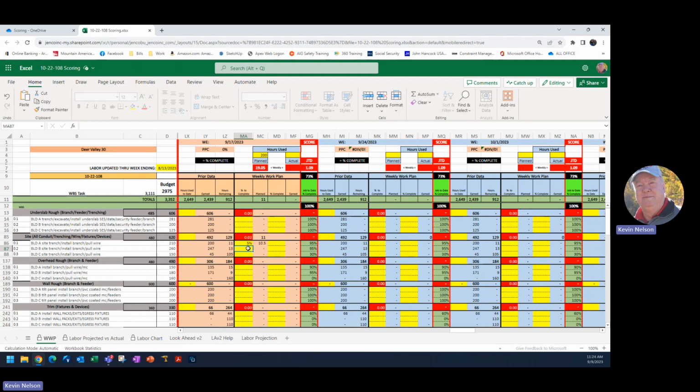So let's continue on. I'm going to determine that I want to finish the building B. That's this row right here. And I want to put in another 5% and finish that off. And I also want to do the same thing as long as I'm set up for wire pulls. I think I'll try to go ahead and get this accomplished. So that gives me currently a planned earned hours of 129, but you recall I'm working 200 hours.